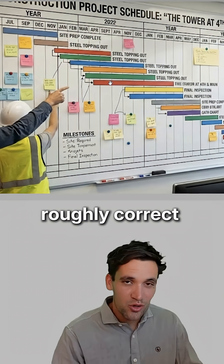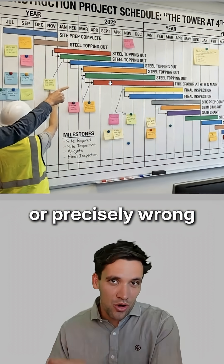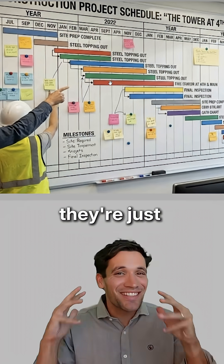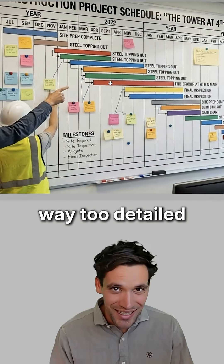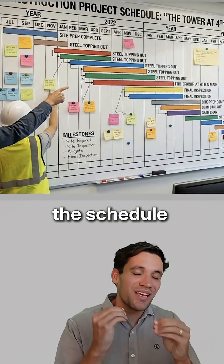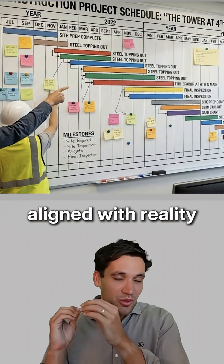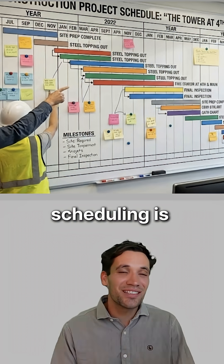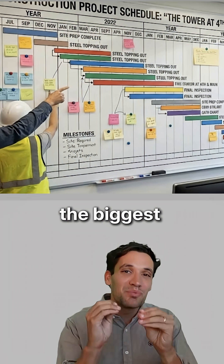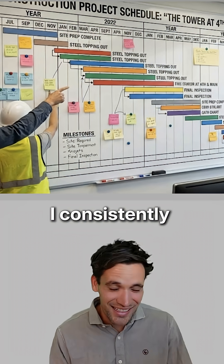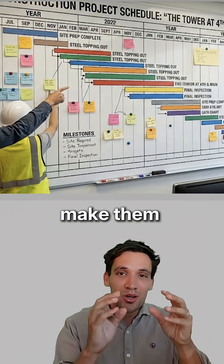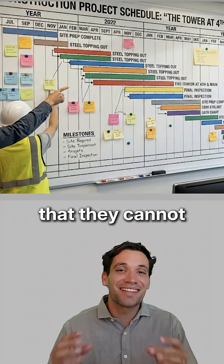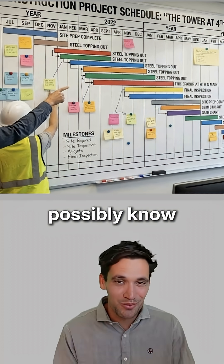Would you rather be roughly correct or precisely wrong? The biggest challenge I see with most construction schedules is they're just way too detailed. Every project I've worked on, the schedule has never aligned with reality — and this isn't meant to be a criticism. I understand scheduling is unbelievably complicated, but the biggest mistake I consistently see is people making them way too detailed and basing them on information they cannot possibly know.